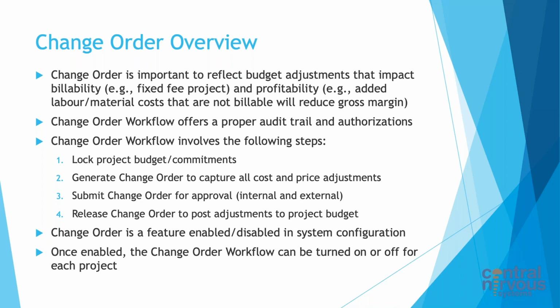Having those budgets locked means that we are able to track change orders to capture changes in revenue, changes in costs, adjustments, new work that needs to be done, anything involving the project. We want to do it through a change order, and that allows visibility to these changes.